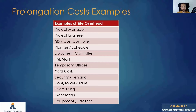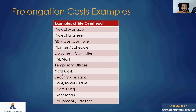This is a prolongation cost claim. If you have an extension of time for three months, for example, the contractor is actually working for three additional months on the project and has to pay salaries, indirect costs, and costs for assets such as staff, temporary offices, yard costs, hoist or crane, scaffolding, equipment, and facilities.